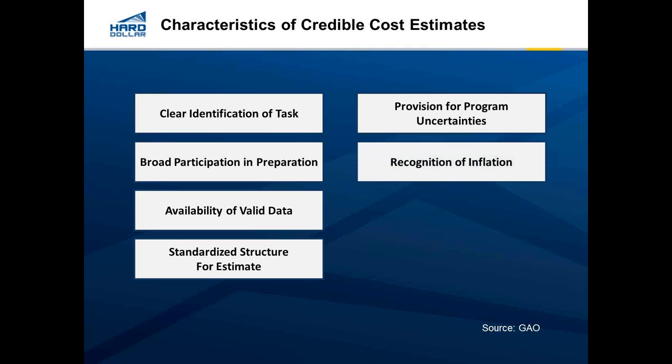One of the things that we can plan on is to keep track of inflation as much as we can. We know how the market is trending to a point, and we can make some predictions on where it's going to be in the future for the labor force, for our materials, and we need to include those extra costs when we're working with multi-year contracts and include that so that that doesn't come back to bite us later on when we're actually executing the work.